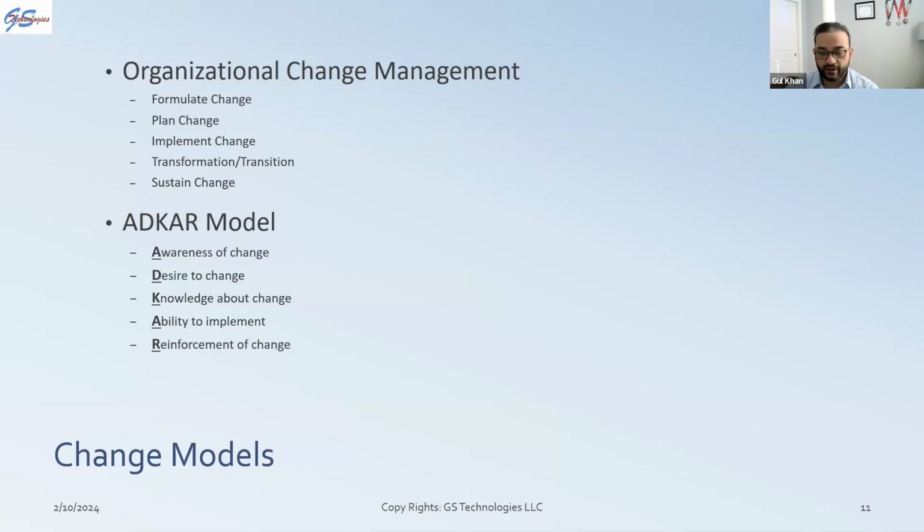Remember, earlier I was explaining the changes, and I said your change management should have this information: the date that change has been introduced, what is the change, what is the impact of that one, when is it due, and the rationale for that change. If you don't have a rationale for that change, there is no reason for making that change at all.